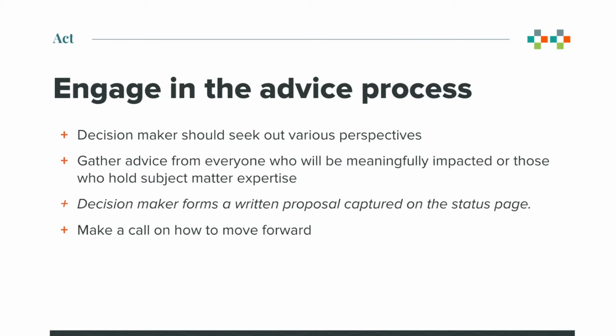Next, you'll engage in the advice process. So prior to forming a proposal, the decision maker should seek out various perspectives, and they should look to gather advice from everyone who will be meaningfully impacted or hold subject matter expertise. This collective wisdom is in support of the pursuit of a sound decision. The decision maker will form a written proposal informed by the advice that they gathered. The proposal is captured in the status page.